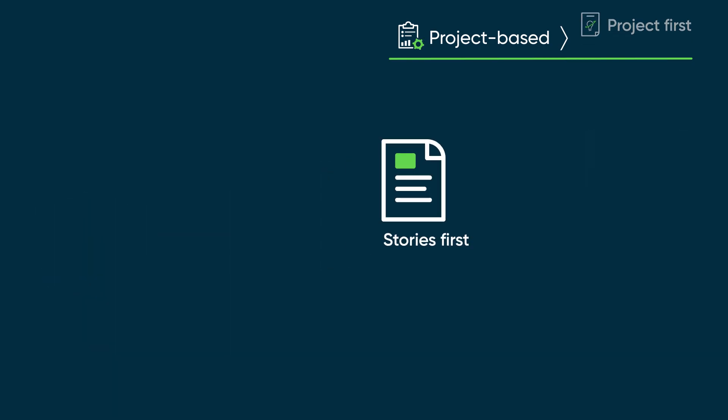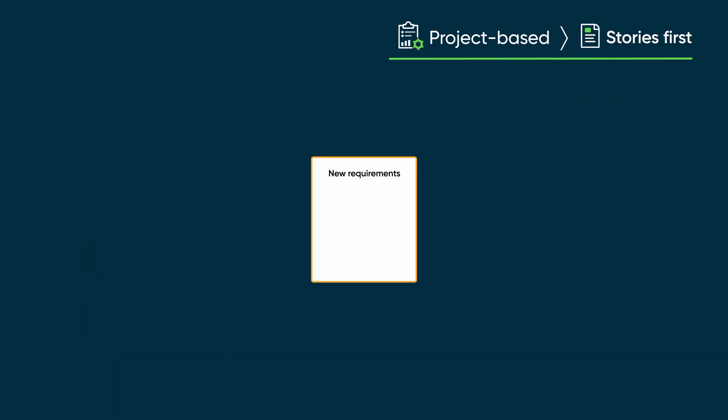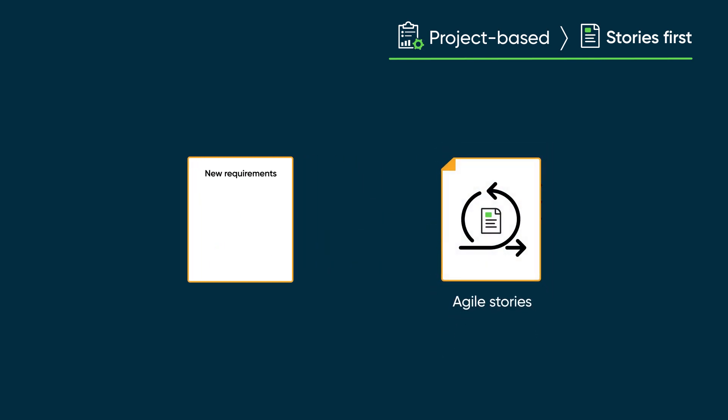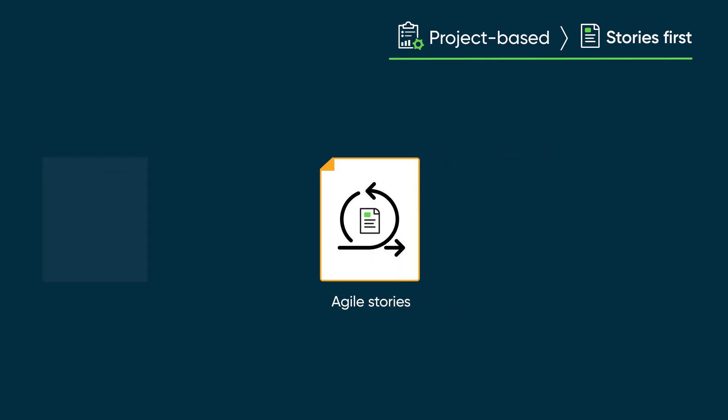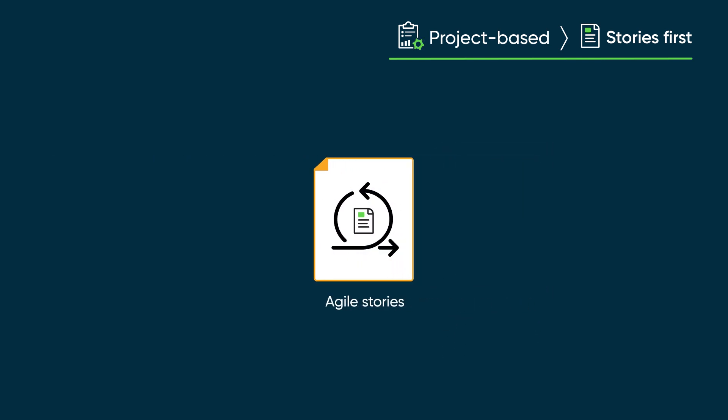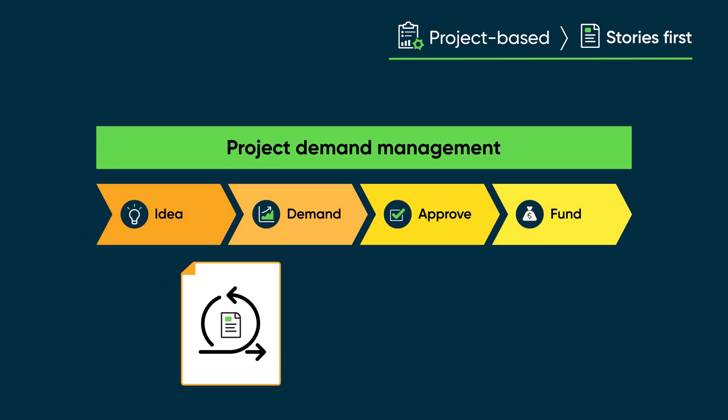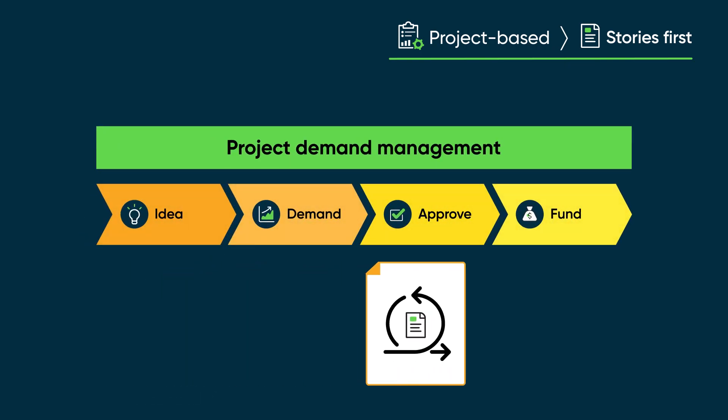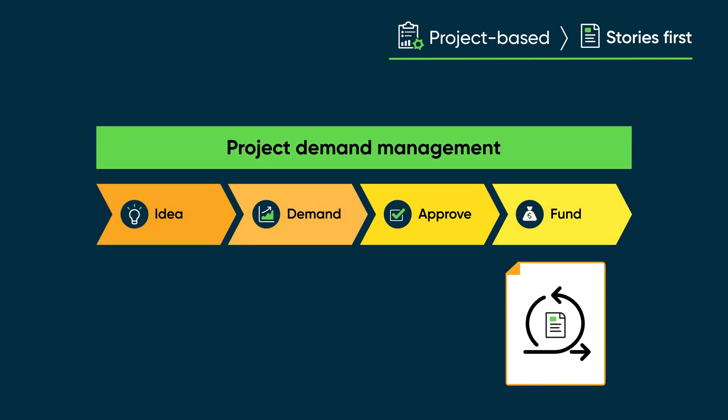In the stories first approach, we collect new requirements in the form of Agile stories. After collecting enough stories, we create and fund a project through the demand management process.